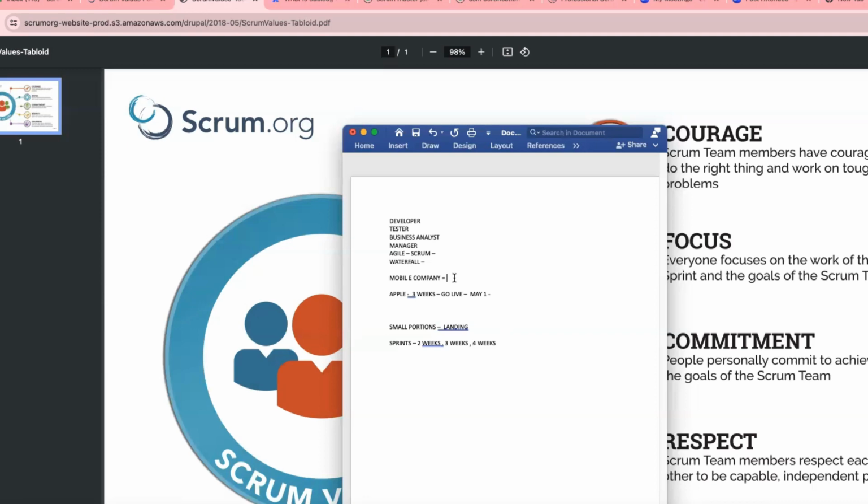Testers test, the business owners finally review everything, and then this is ready before May 1st, like 1 week before May 1st. So we won't wait till the last date. For go live, the product has to be finished 1 week before that. Only then can we go live on May 1st. It's a very short deadline.